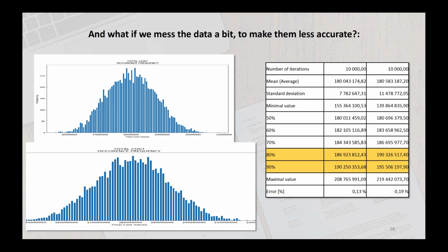So as you can see, the Gauss curve became a little bit more flat and a little bit wider. It means that in order to chase the 90% confidence level we want to achieve, we have to go a little bit more to the right. It means that we need to put additional money into the budget to cover the risk of landing in this area.